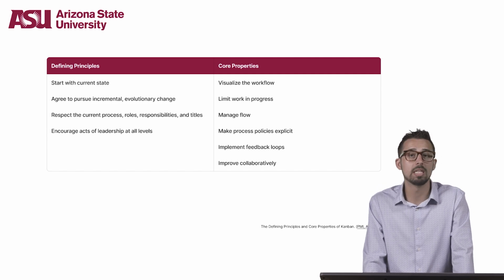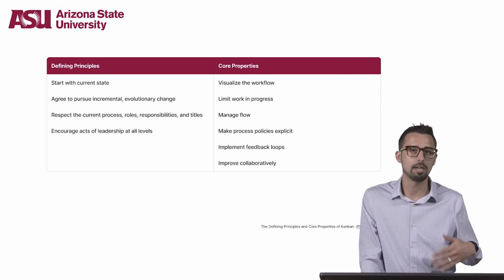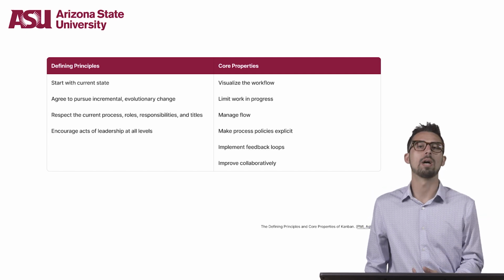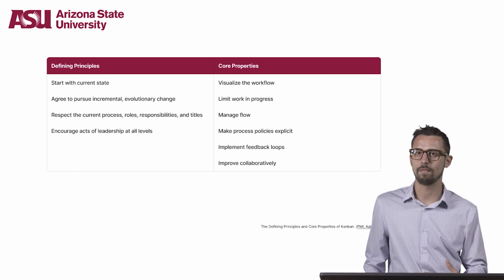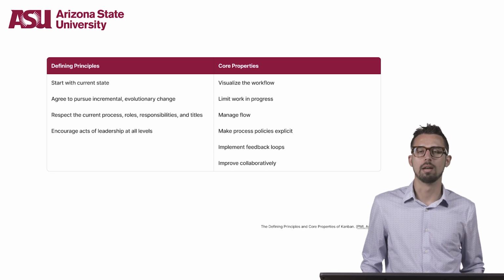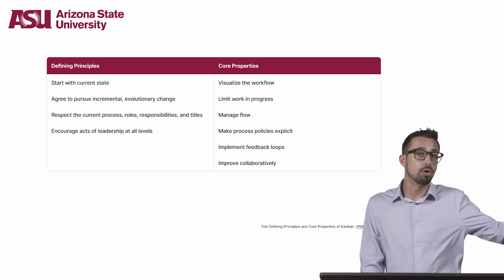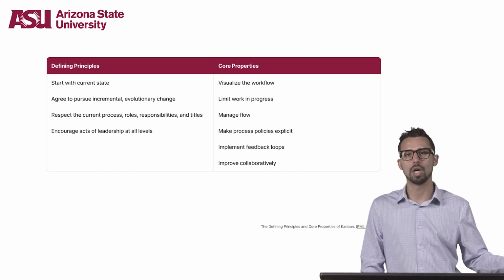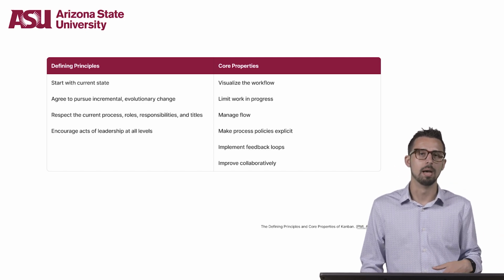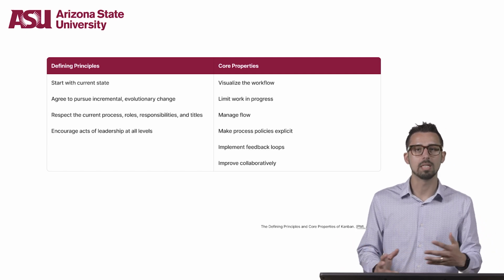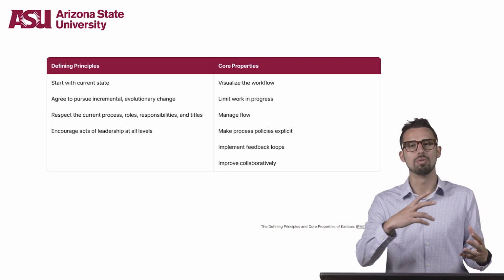The Kanban method is a holistic framework for incremental evolutionary processes and systems change for organizations, I should say. The method uses a pull system to move the work through the process. When the team completes an item, the team can pull an item into that step.